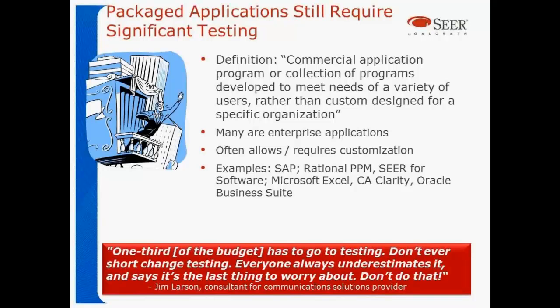Now, we talked about using packaged applications. We haven't done sufficient analysis to know if a packaged application would have made the system better or not, and we're sure competent people did that analysis. But even had they used completely packaged software, about a third of the budget needs to go to testing. People often assume in packages, and there were some packages used in HealthCare.gov, that they don't have to test it because it's working.